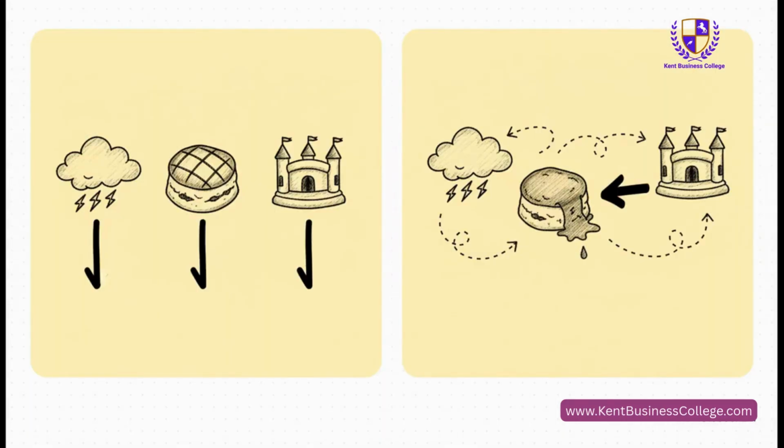Also, it's worth knowing that the simple chart we just built assumes that each risk is its own little island. It tests one thing at a time. But in the real world, risks are connected, aren't they? I mean, torrential rain is definitely going to affect how many of Aunt Mildred's scones you sell. So just know that for really complex projects, there are more advanced versions, the pro versions, that use fancy techniques to see how all the risks are tangled together.